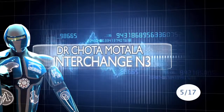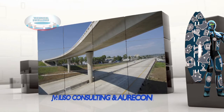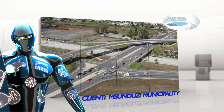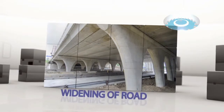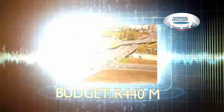The improvements to the Dr. Chotamutala interchange on the N3 was submitted as a joint venture project by Elisa Consulting and Oricon for Senro. The widening of the road from 4 to 6 lanes was fraught with unforeseen challenges that caused the budget to increase from 300 to 440 million rand and delayed completion by 8 months, and 0 construction-related accidents occurred.